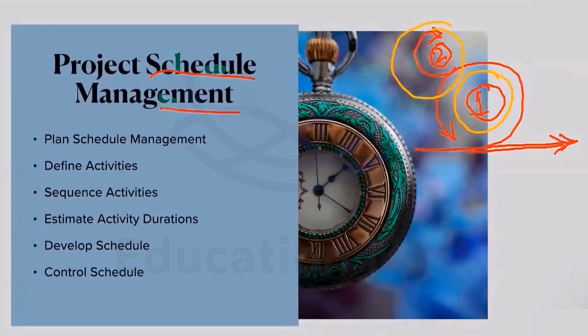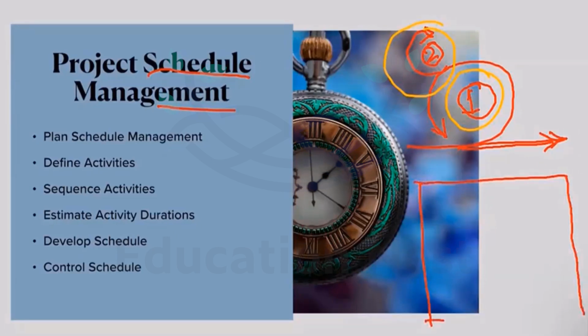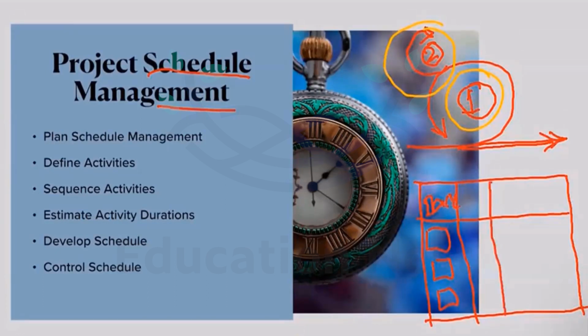agile method. And the second important tool in agile itself, because we are talking about the trends, is the Kanban board. Kanban board, what does it mean? It's nothing but in the first column, we list down all the activities with the help of sticky notes or something like this. This could either be a physical board or a common OneNote, or even some nice tools like Jira. All these project scheduling tools help us to list down the tasks first. These are all backlogs. First backlogs are listed, and then column one we will have to do, right?